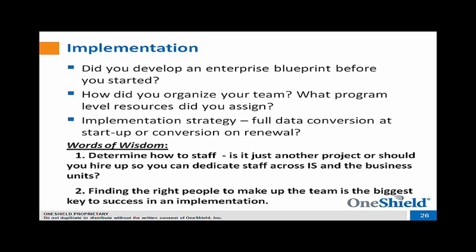Additionally, you'll have a business sponsor who is typically responsible for the business sponsorship and advocacy of the program as a whole. You may have business sponsors down at the individual module level too, but very often we see a program level business sponsor as a key individual there. And also an architect at the program level; having someone who understands how all of the pieces fit together across the individual projects is very, very important. Sometimes we'll also see a business architect across a program, which is very beneficial. So someone who is aligning the business processes and the business analysis across the different efforts within the program.